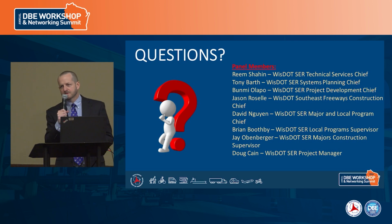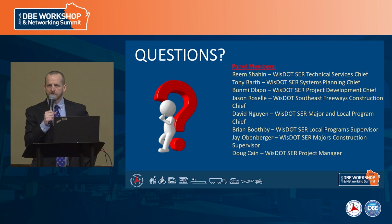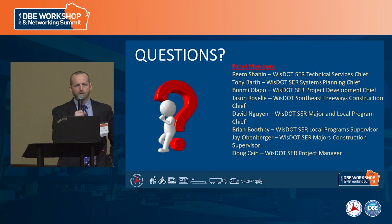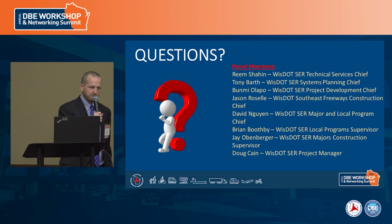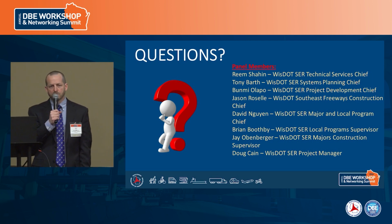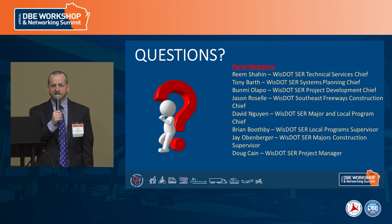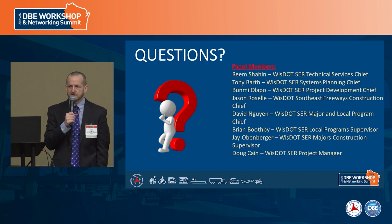We have a lot of issues, and we've been working on it for a long time to try to expedite that process and make sure we're communicating with each other. But there always seem to be some issues with getting that information timely, and that will hold up payment. We have requirements, through Federal Highway Administration and our own process, that we will withhold percentages of items if we do not have all of the material information that documents and supports that the materials meet the requirements.